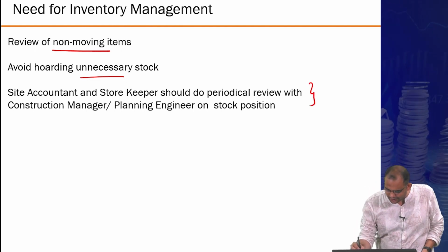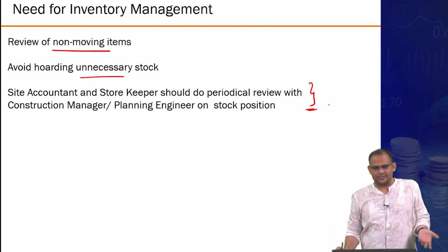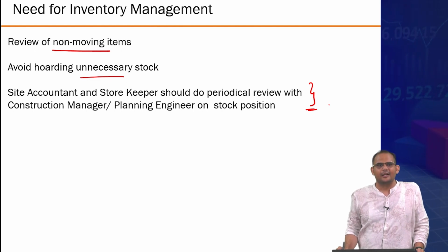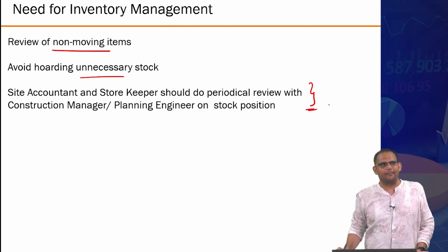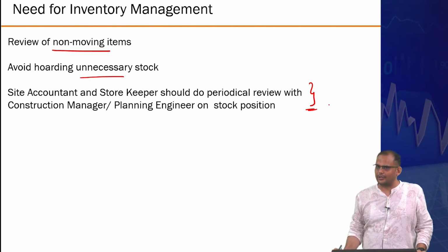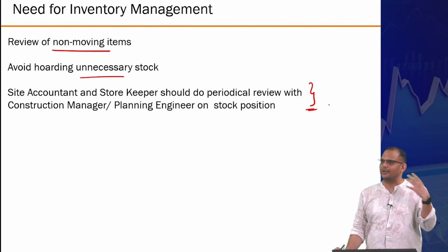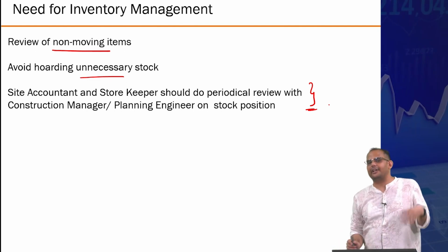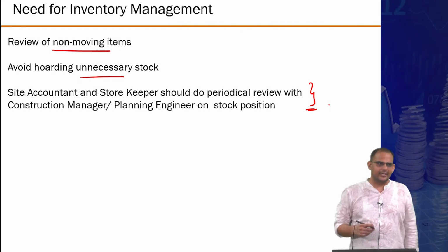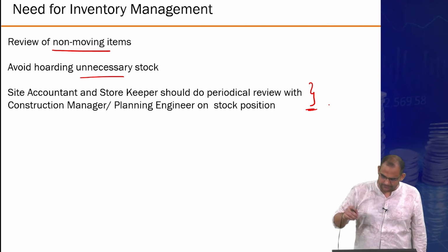And you should do a thorough review. So that's a very generic recommendation. But essentially, you should have a project accountant on the site thoroughly review what are the goods which are moving, not moving, how is the inventory management for each and every good or resource on your particular site.